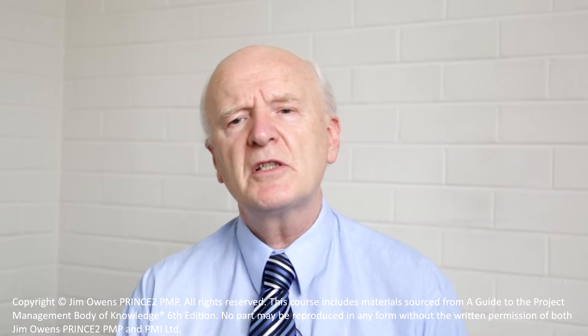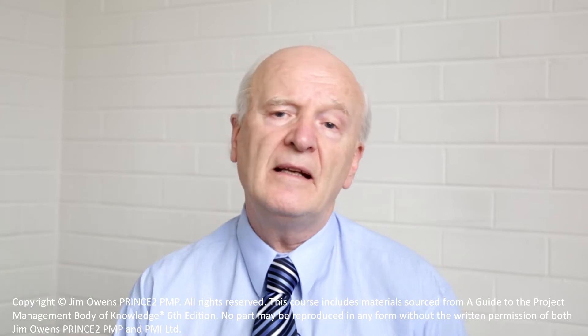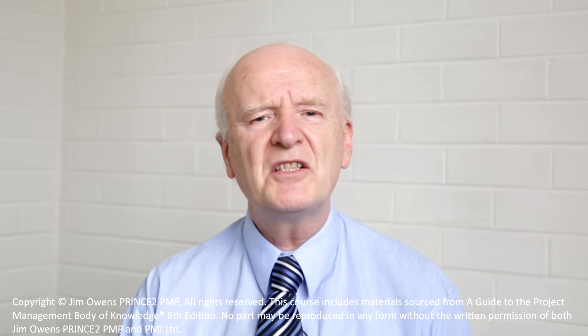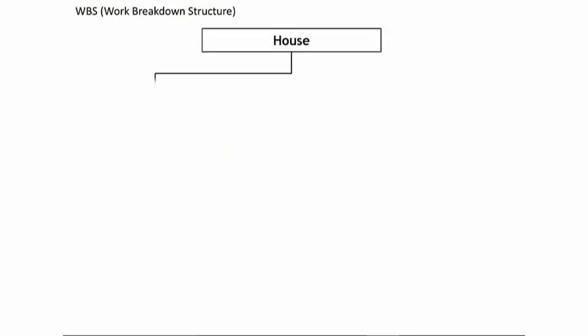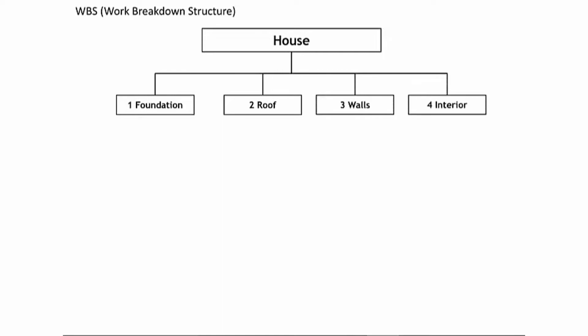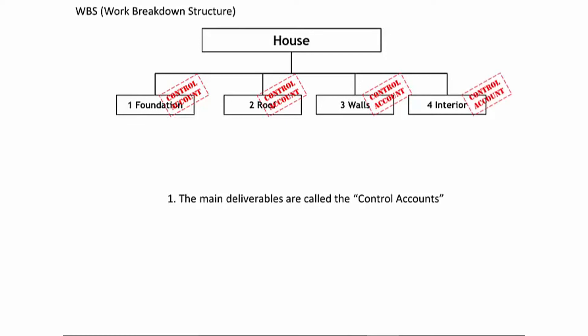A house is too complex for people to deliver as-is, so we need to break the product down. The process of repeatedly breaking down a product into simpler components is called decomposing. Let's decompose our house into the main sub-deliverables: one — the foundation; two — the roof; three — the walls; four — the interior. These main sub-deliverables in the Work Breakdown Structure are called control accounts. The foundation, roof, walls, and interior are each a control account.